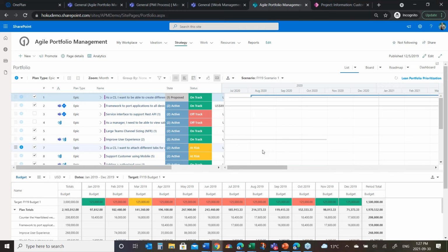So we're doing that prioritization and planning here. And I'm not going to sit here and play around with any more of this, but the concepts are there. I set that target. I move my data. I maybe pause some projects. You can see the ones that I clicked. A couple are off track, so there may be a reason why we want to stop them anyway, because they could be threatening the budget in other ways. I could then turn around and look at this from a resourcing perspective and say, where are we in terms of resourcing availability and resourcing capacity against those same projects? And then I save the scenario and move forward with my planning and executing on these projects.